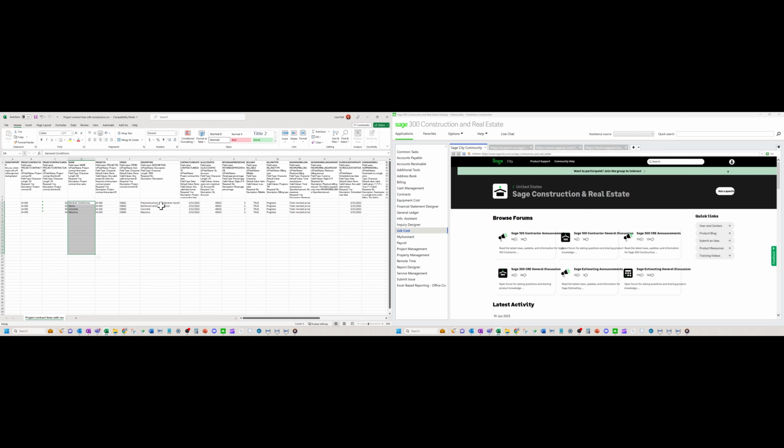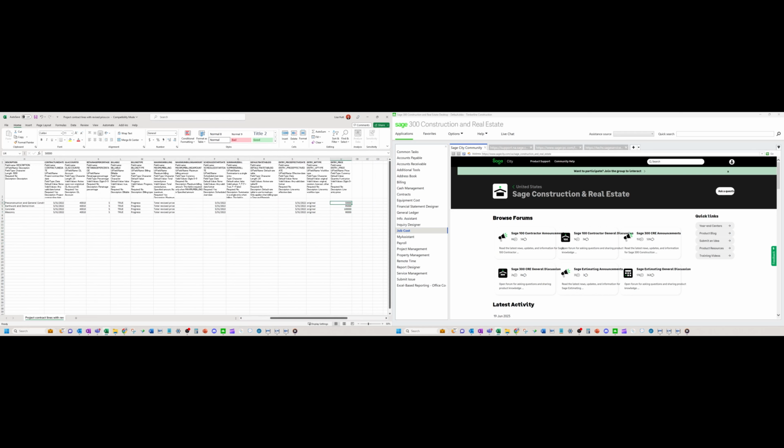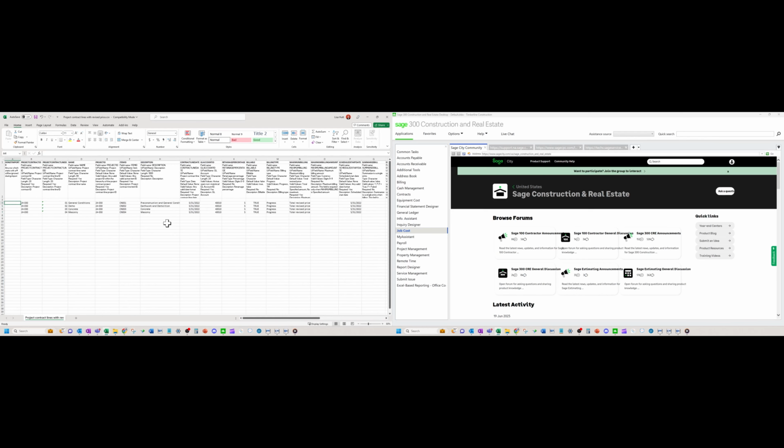Once you set it up once, some of these fields stay the same, like your account number, retainage maybe, and these especially. The date you might change, and then over here you just put in your amounts. Again, simple progress billing, lump sum, no rate tables or anything. It's a simple fixed price one. So I'm going to minimize this. This file is saved as a CSV.